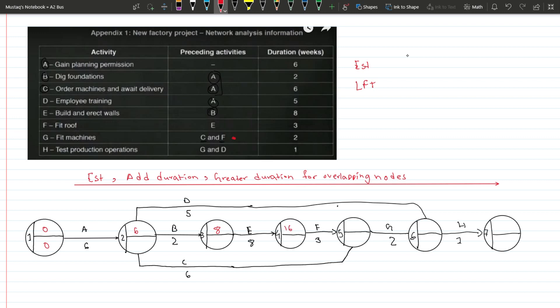Continuing: eight plus eight equals sixteen, and sixteen plus three equals nineteen. Now at G we have an overlapping situation where C and F both lead in. F's path gives nineteen days, while C's path gives six plus six equals twelve. Since we take the greater number, we go with nineteen. For H we have another overlap: nineteen plus two equals twenty-one, and five plus six equals eleven, so we take the greater value, twenty-one.